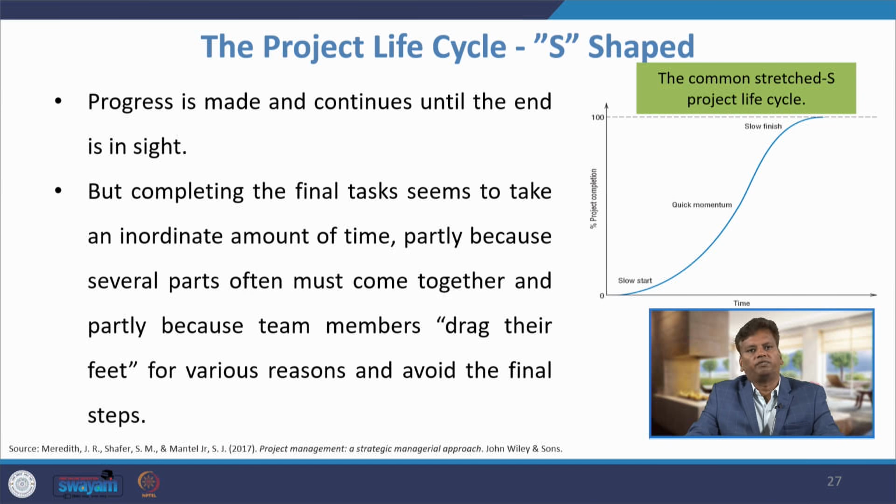But completing the final task seems to take an inordinate amount of time, partly because several parts often must come together and partly because team members drag their feet for various reasons to avoid the final steps. So, this is an example of the S-shaped project life cycle.